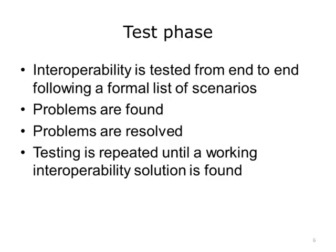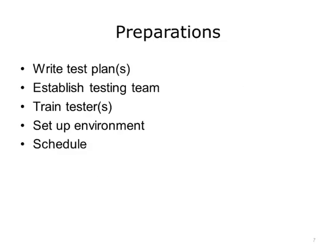The testing phase of a project is when interoperability is tested from end to end following a formal list of scenarios. Problems are detected and resolved, and then testing is repeated. These steps repeat until testing is fully successful. It is important to prepare for the testing process. The steps to prepare for testing include writing a test plan, establishing who will test, providing training for testers, setting up the testing environment, and scheduling the actual test. Remember that the test will need to be repeated numerous times.